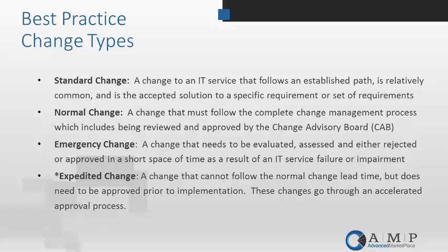These are requests that come from the business but have a very time-sensitive nature to them. So they are not a result of something that's broken, but they need to get into the system real quick. When working with a lot of organizations, we have identified the expedited change, which in essence has to be done in an accelerated format, but we don't want to classify those as truly emergency changes, because they're not. They're just requests from the business, or potentially within IT, that are urgent and need to get done. So they can't follow the normal process of approvals potentially. They may have to go on some accelerated time frame.